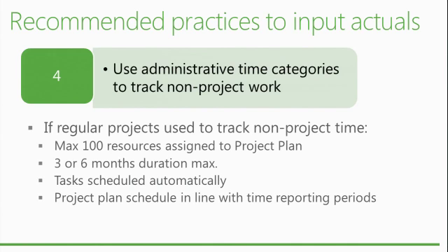So that's also an option. If you want something at a very high level, you can decide to report the time just at the project level and just on a bucket per week, and that's it. Then Project Server is going to recalculate and distribute all that across the periods, basically the days and so forth.